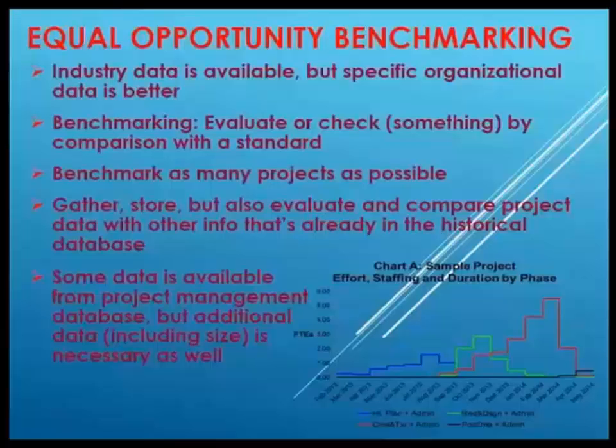I recommend benchmarking as many projects as we can. We can always take subsets of that data when we want to apply it, but generally speaking, the more the better. To do an estimate or to create a template for an estimate, you can use any subset. It can be as few as one or two projects, or it can be as many as you can get. Again, the more the better, but sometimes you want to get more specific, and it may be perfectly appropriate to use a very small subset.